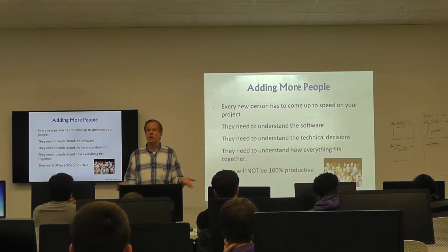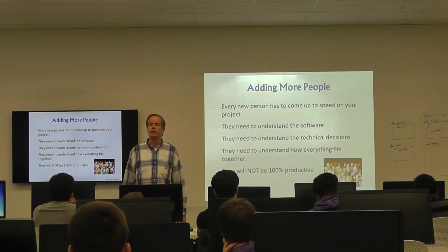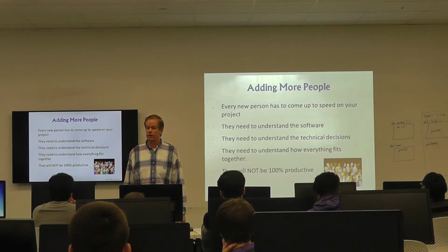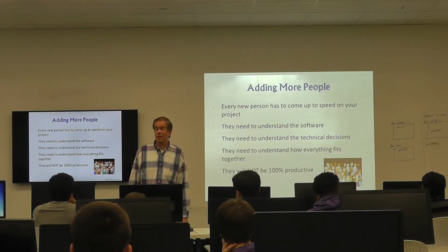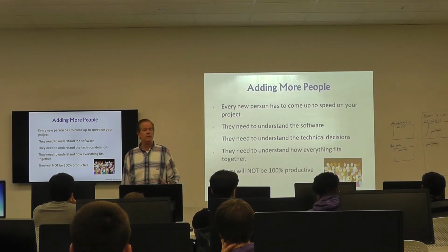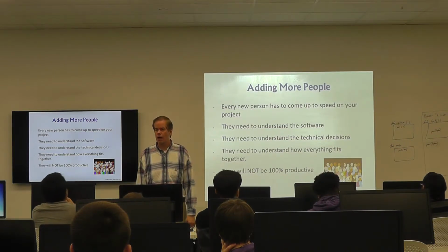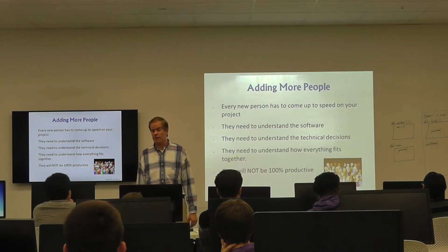Most importantly, when you add a new person to your team, they are not going to be 100% effective right off the bat. In fact, it might even slow the overall team down as everybody works with them to get them up to speed. So adding people to a software team that is behind schedule is not a magic cure under the best of circumstances.